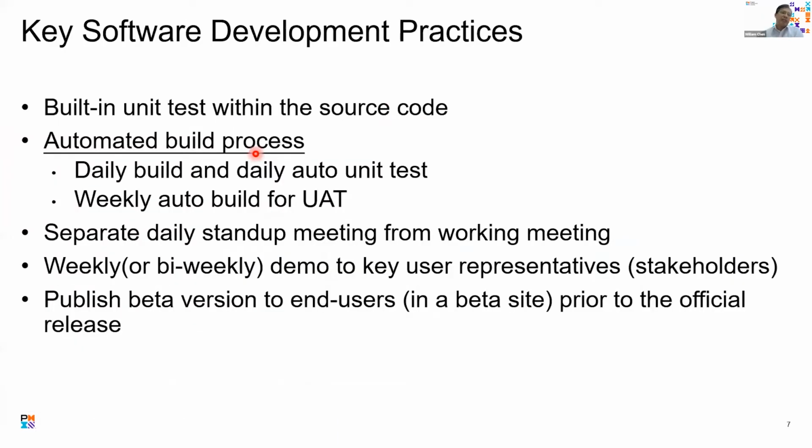So here are a few practices we do. First of all, when you have a very quick waterfall cycle, which is why we have a waterfall in only 2 weeks, not in 2 months or 4 months, a lot of things have to be automated. So our developers write their software code with built-in unit tests. And all those software building processes are automatic.